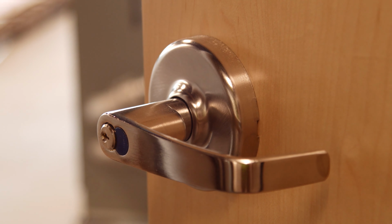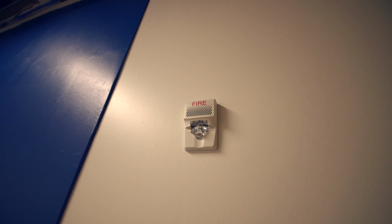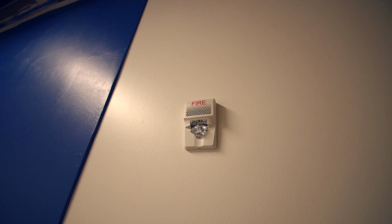We got all the interior doors hung and all the door hardware on. A big rolling barn door at the reception area, got that hung. Carpet guys have been in laying carpet, putting all the rubber base on. Plumbers got the plumbing fixtures in, the toilets, the faucets. So a lot of the finishing touches have been going on in February. We did our city inspections. The fire department had to come do their tests here.